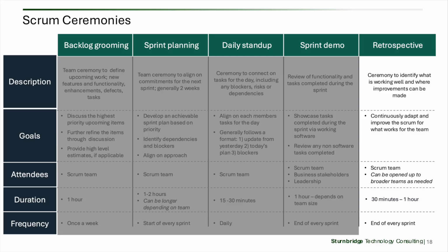In general, the way that I've seen the sprint retrospective take place is usually at least 3 parts of conversation. First one is what worked well in the sprint. The second one is what didn't work well in the sprint and what should we stop doing. And the third one is what should we consider or try next to help improve our processes.